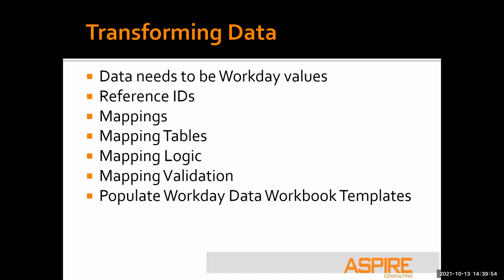So you need to get the data from that mapping document into your database. And once you have that mapping in your database, then your SQL script can reference that. And while you're extracting data or going against the data you've already extracted, you can convert your PeopleSoft values to Workday values. And all that logic then is stored in your script.